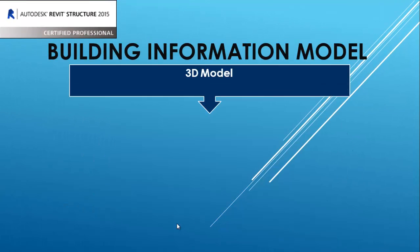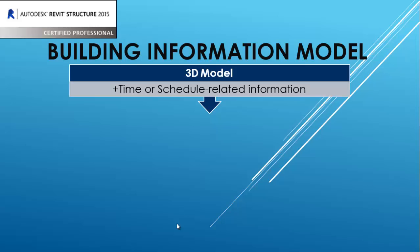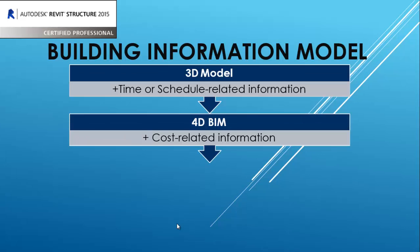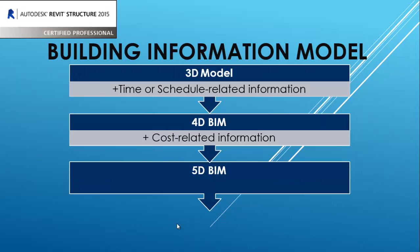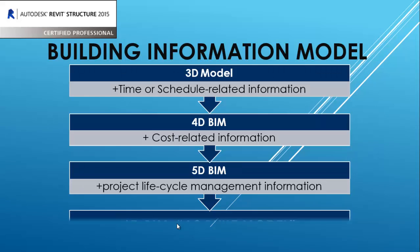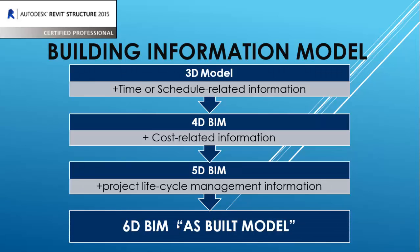Building Information Modeling, as we said, uses the concept of a Building Information Model. A 3D model, when we add time and schedule-related information, becomes a 4D Building Information Model. When cost-related information is added, it gives us 5D BIM. If we then add project lifecycle management information, we get 6D BIM — also known as the as-built model — and that is the main use of Revit.